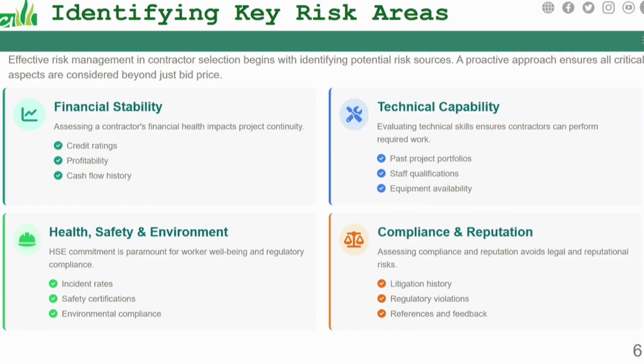Quality control is not here, but for some projects, quality is key; you cannot do it without it. But you look at these in terms of the core ESG issues, all these areas come into part of the core ESG issues, where you have to assess them financially. I mean, you cannot imagine you give a job to a contractor and he's owing a bank. You give him mobilization and the bank swallows all the money. How is he going to do the work?